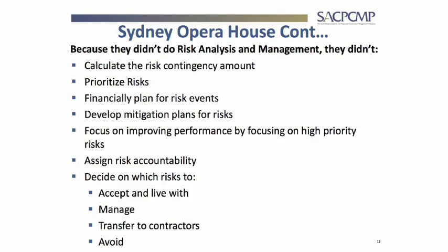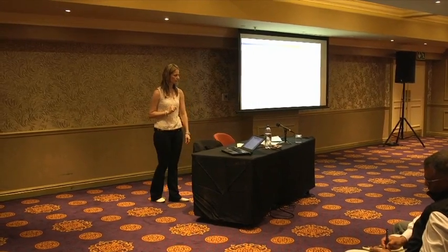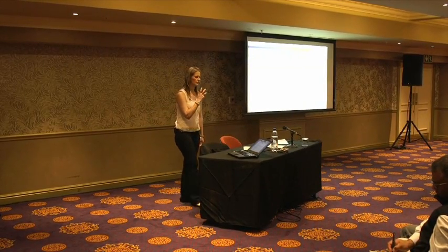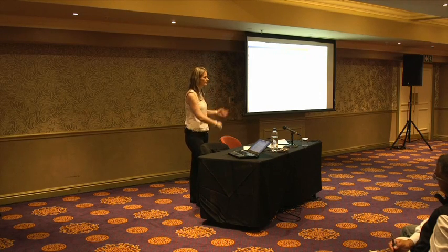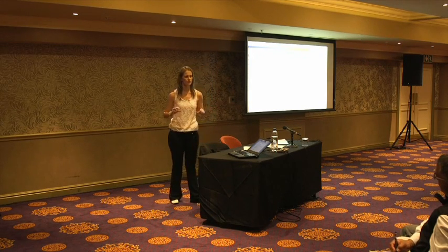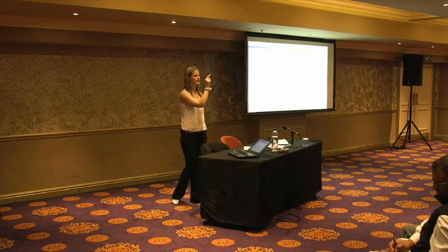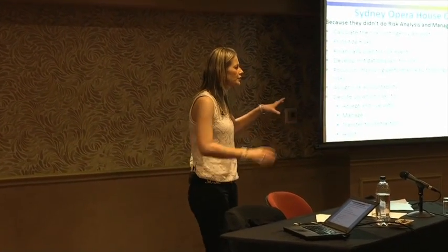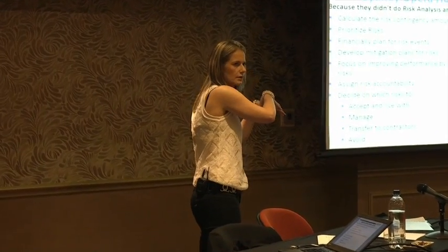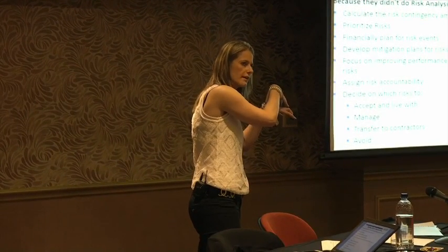So develop mitigation treatment plans, very important. Funny enough, if you guys don't know, with a mitigation and a treatment, you never mitigate or treat the risk. You treat and mitigate the cause. Because the risk will have multiple causes, and you need to mitigate the causes in order to bring the likelihood or the impact of the risk down. You never mitigate a risk. The risk will be the risk. You need to mitigate what is causing that risk to happen.